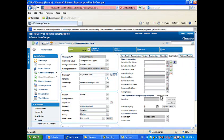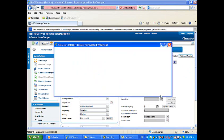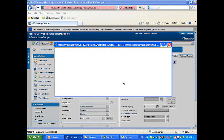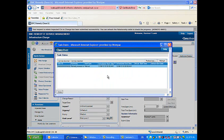It is easy to set the change request dates using the task start and end dates. Click the view task date button and in the pop up box select the task with the earliest start date. Click close.